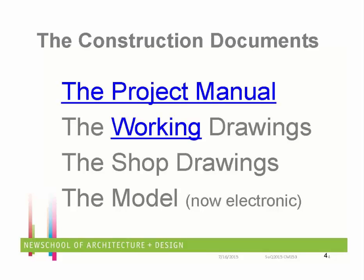Yes, if you're going to have public money, you're absolutely going to have a project manual, because of the bonding information and everything else that has to be in there. Where do you dispose of dirt? How do you handle stormwater? All of those things have to be defined either in the working drawings or in the project manual. And in the project manual, you're probably going to have all the forms that somebody will have to report their quality work on, so that there's a method to it. Then there's somebody in the architect's office who will be receiving this on a continuous basis, documenting it, filing it, and making sure their records show that everybody was up to speed on it. The third thing that happens is when we get the project bid.